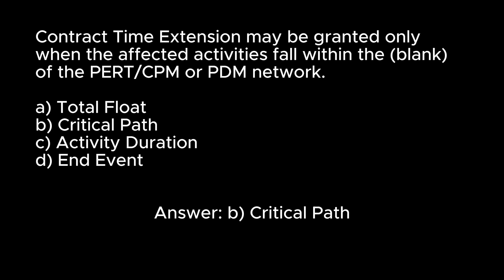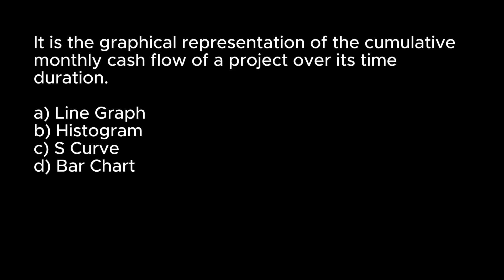It is the graphical representation of the cumulative monthly cash flow of a project over its time duration. A. Line graph. B. Histogram. C. S-curve. D. Bar chart. Answer: C. S-curve.